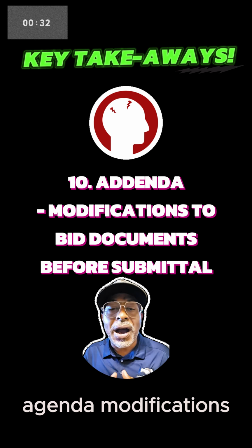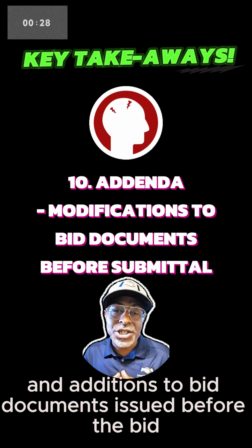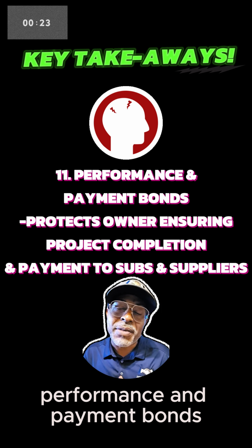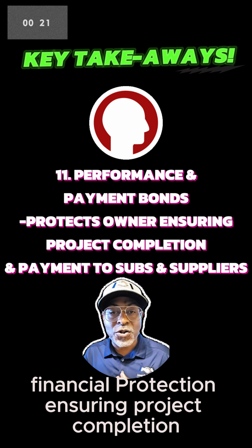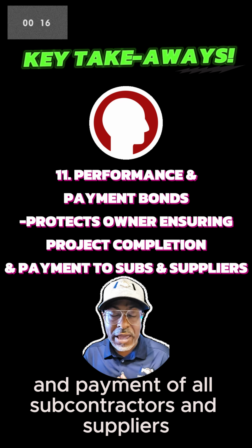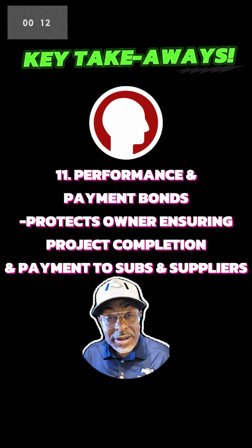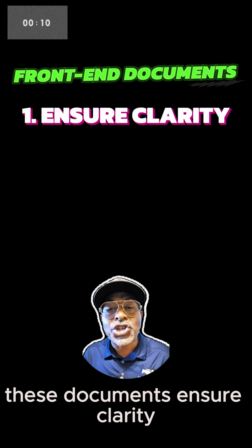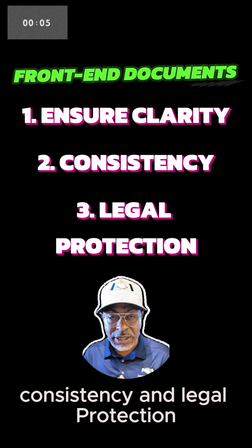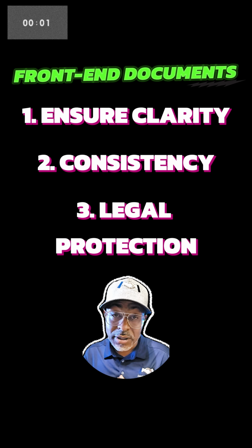Addenda, modifications or additions to bid documents issued before the bid opening. Performance and payment bonds, financial protection ensuring project completion and payment of all subcontractors and suppliers. These documents ensure clarity, consistency, and legal protection for all those that are involved in the construction project.